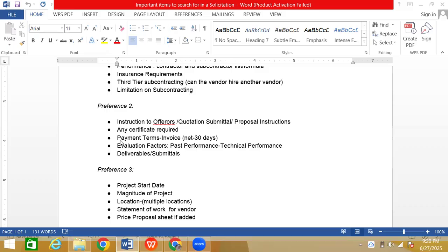So ask the vendor, as soon as you have a quote from them, what are your payment terms? Many times it is written on the contract or whatever quote they give you. It is mentioned underneath that this is our payment method. You're going to pay us in 3 installments. First a deposit of 50%, second 30%, and one after completing the work, 20%. So you see, they're asking for a 50% deposit first, then 30% during the work, and the remaining after the work.